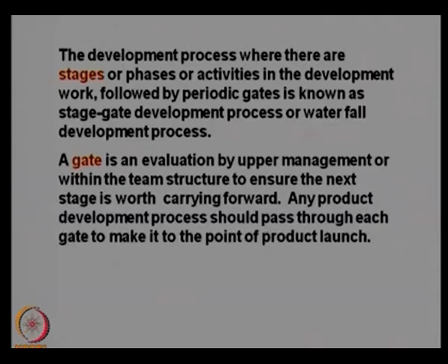Most of the projects will be scrapped at the initial stages, but not at the later stages, because once we put a lot of effort into developing a product and come to a particular stage, scrapping that project may not be viable. So in most cases, the scrapping of the project will be done at the early stages, and at the later stages modification of the product or adding new functionalities to meet the present requirement will be undertaken. Though the project continues, the final product may not be the same as what was anticipated in the beginning of the process. This is the stage gate development process.